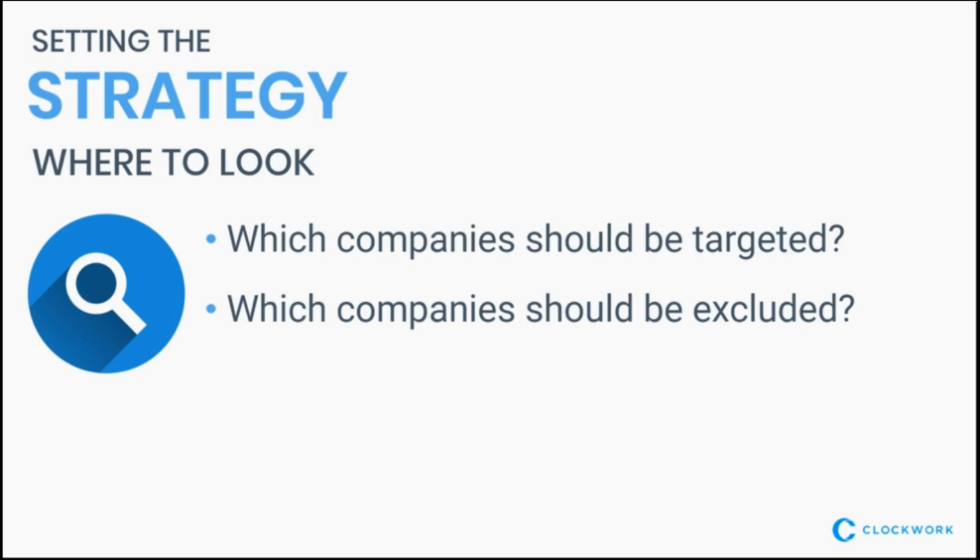Don't make that mistake. It may seem implied when you present a client a list of companies to sign off on that they'll actually do the review, but continue to cover yourself and ask the extra question. In addition to this list, is there anyone that we shouldn't be looking at?